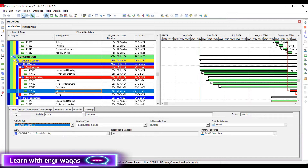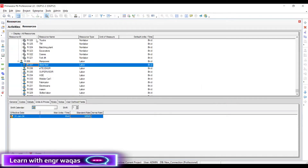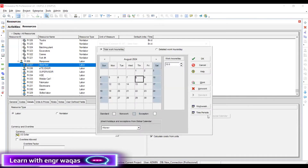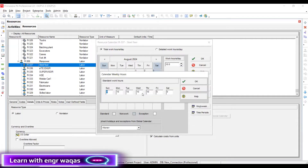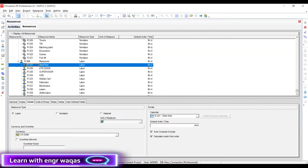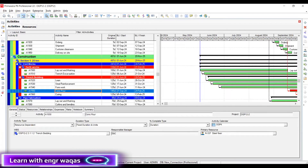The second step: go to the resources main window, find the steel fixer — that certain resource on which the activity is going to depend. Then go to details and create a personal calendar. Make customizations as needed: for example, this resource is not available Thursday, not available Friday, and not available Saturday. So it's only available Monday, Tuesday, and Wednesday. Now you can see the change — before it was 125 days, but now it is going to 145, because this activity is not going to follow the global calendar. I have made it resource dependent and created that resource calendar.